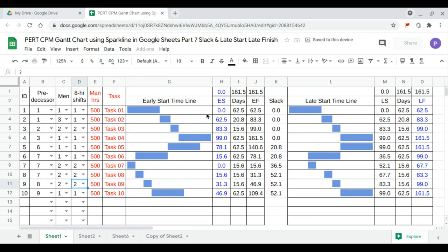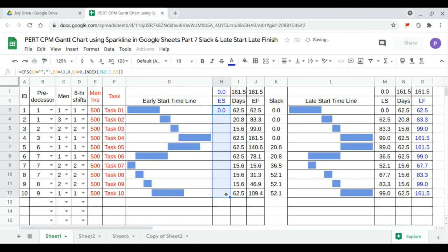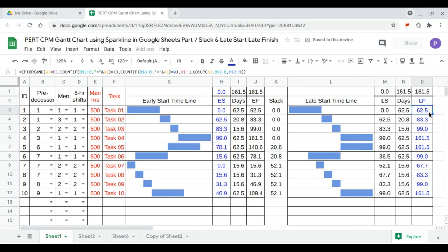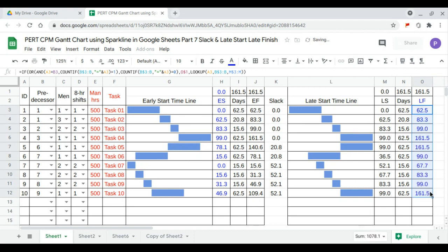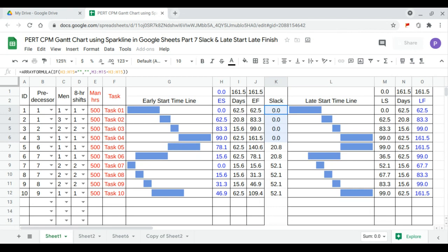Then we will drag this downwards. And drag this downwards. This time the critical path is from 1 to 4. Because of the slack. Zero slack.